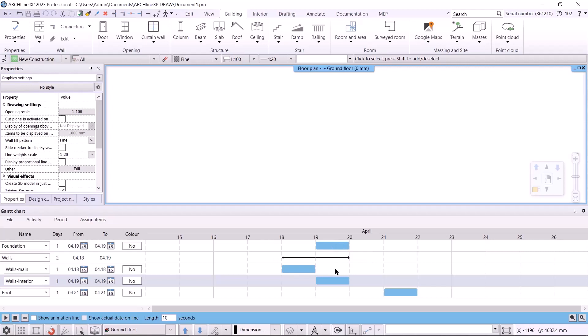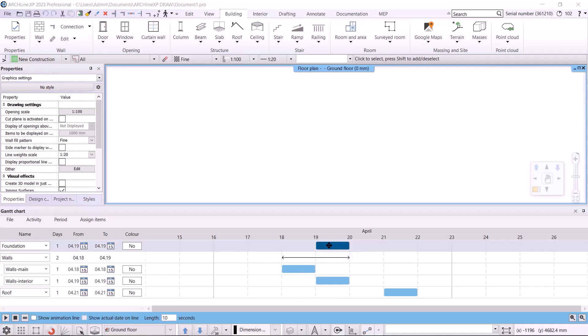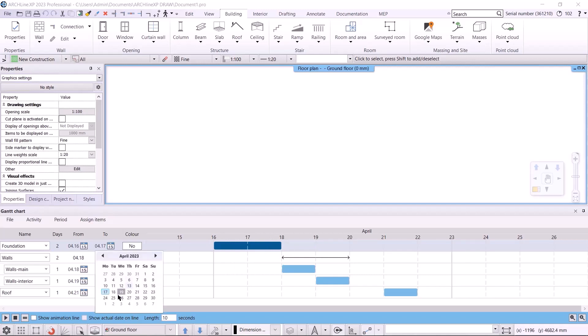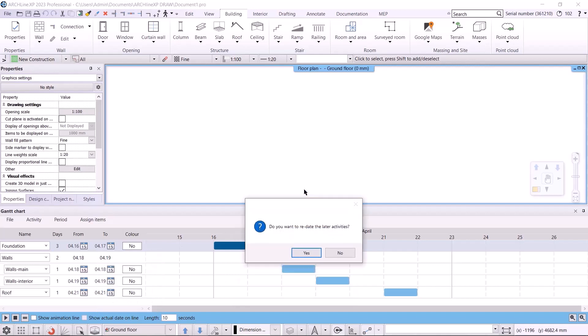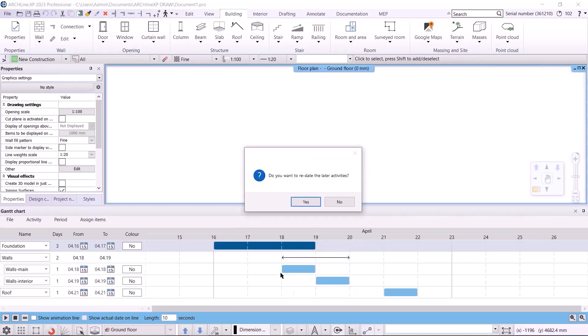We can see the periods here. Some periods are pre-made, but we can also modify them manually. To do this, we just need to click and drag with the left mouse button. For example, this activity starts on the 16th and lasts for one day. We can also adjust the length manually — if we drag the arrow to the right, it now lasts from the 16th to the 17th. If we click on the small calendar here, we can also modify it, say that it lasts until the 18th. The program will ask if we need to reschedule the later activities, since for example, the main walls and foundation are currently running in parallel. If we choose yes, it will push these activities one day later; if we choose no, the program will leave the activities in their original schedule.